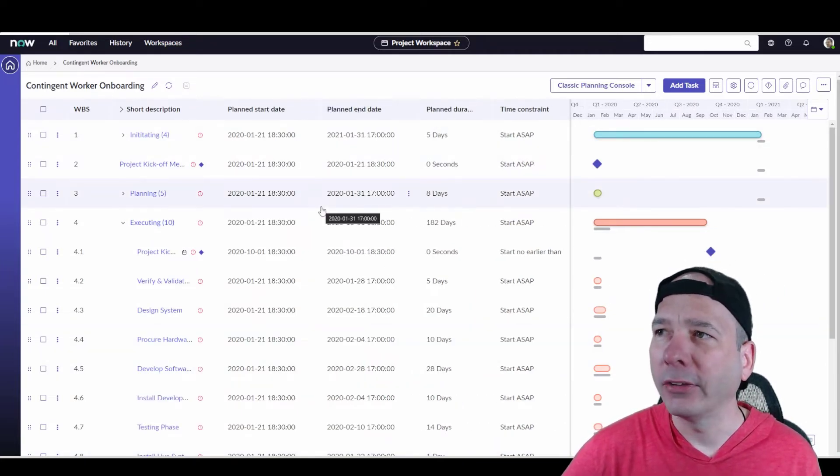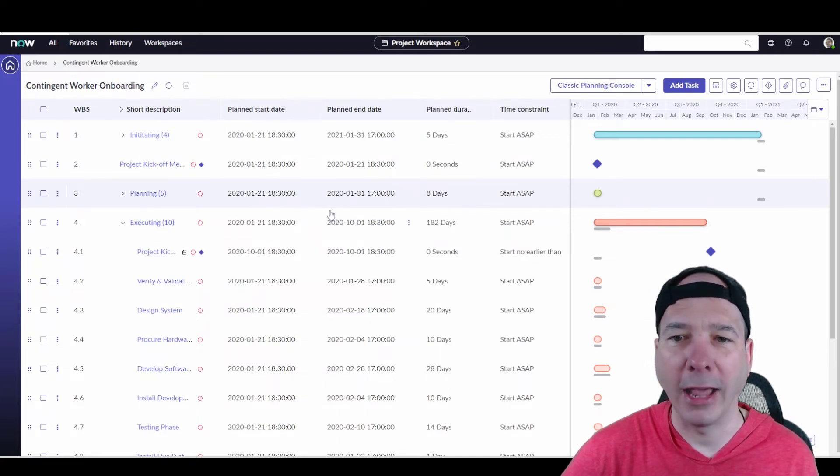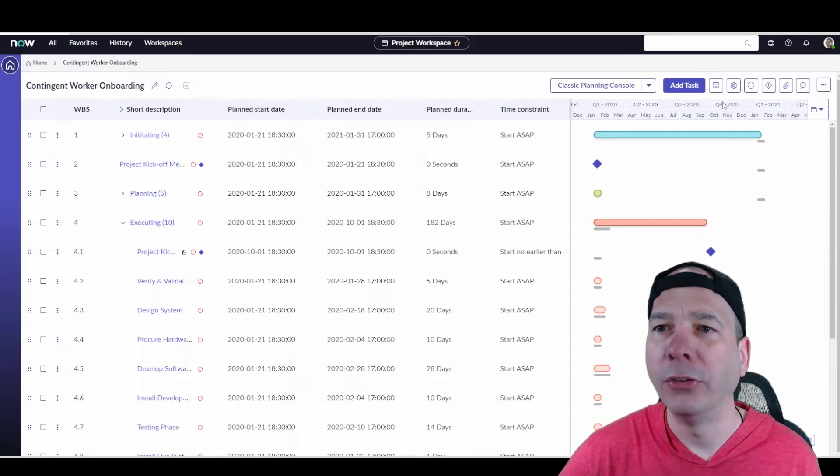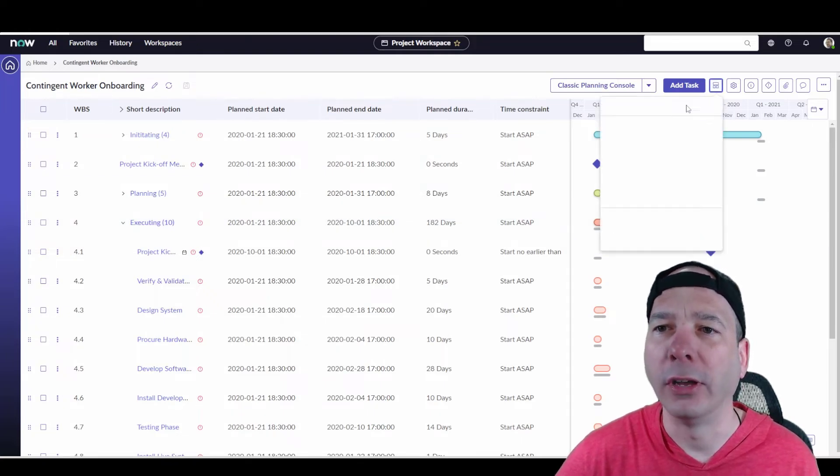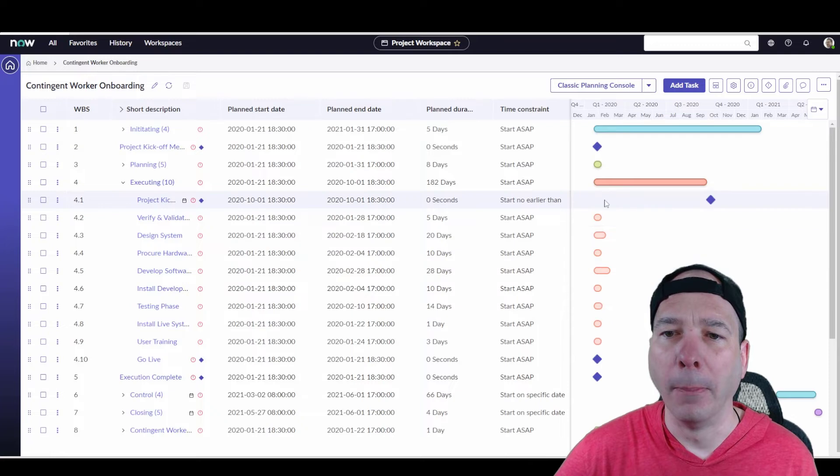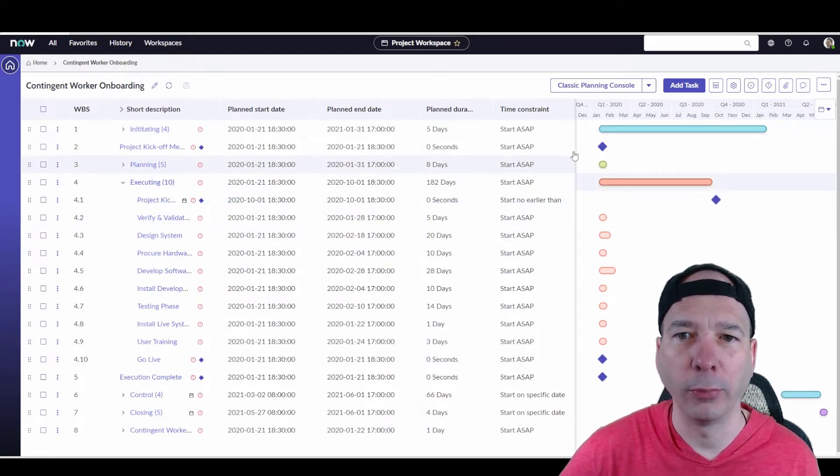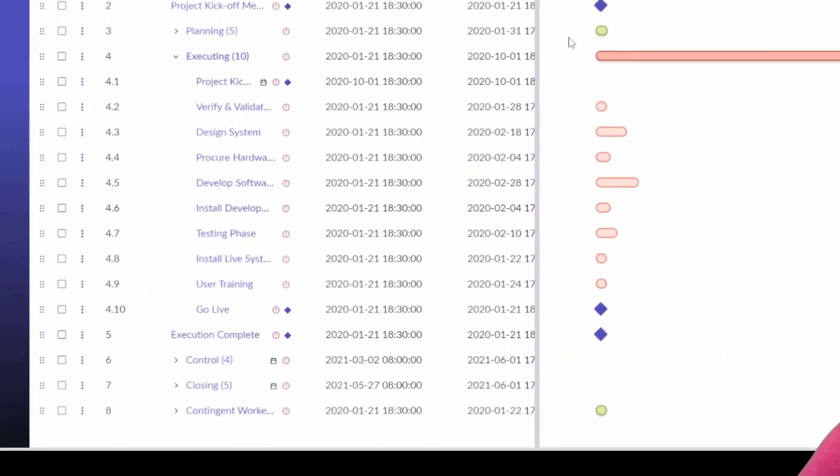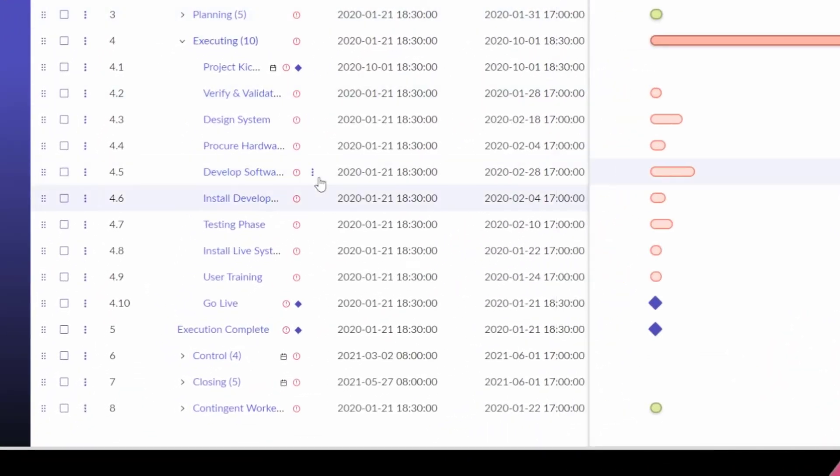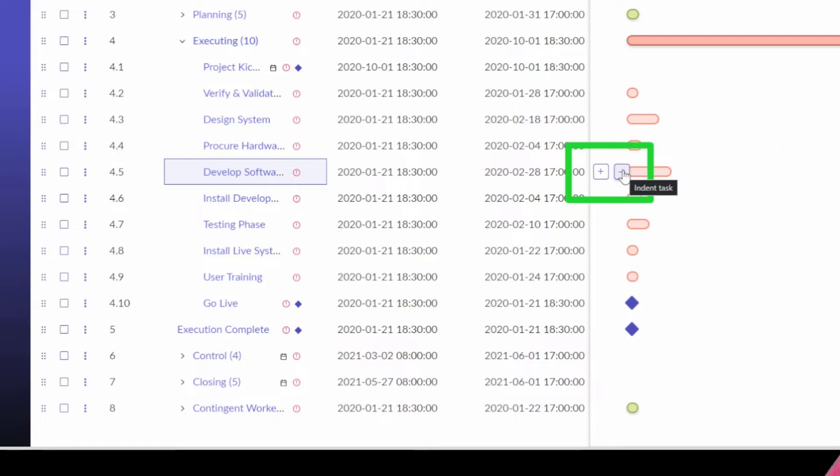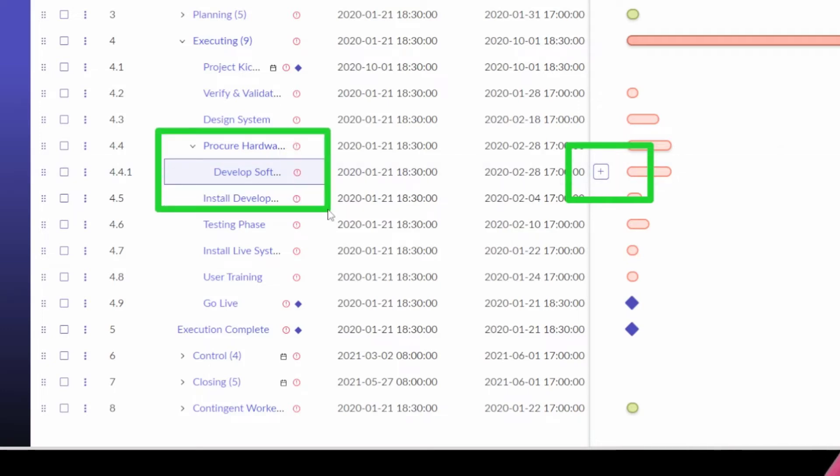The next thing that's new that I want to show is actually the adding and indenting tasks. So, let me turn off the baselines here for a second. I'm going to show that in a minute. But, so, when you're clicking on a task here in the work breakdown structure, let's move this over a bit so it's not behind my head. If I click on a task here, let me go to develop software, right? Notice these two new buttons that show up on the Gantt chart. So, I can take that, I can indent this task using this button, or I can create a new task below it using that button. So, let's look at that. There's an indentation, and you see it moved it over here under the procure hardware task. So, that was the indentation happening.